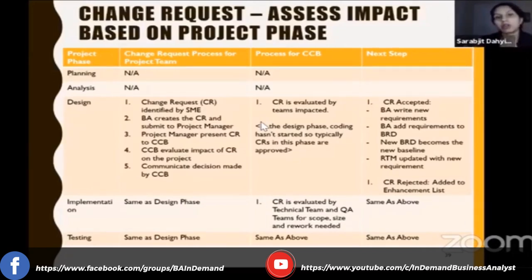That's when the product owner and I, as a marketing person, will go offline and talk about what I want. Once that is decided between the stakeholder and the product owner, the product owner will add that to the product backlog, and then based on everything on the product backlog, it's prioritized. These are called product backlog grooming sessions, between the product owner and their stakeholders.